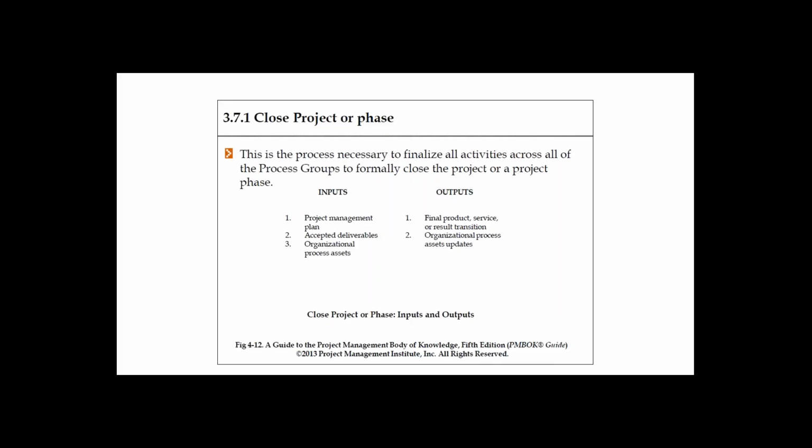Result transition, what is it? Can anyone give some light on that? I think it's knowledge transition, Raju. Yes, that is one part of it. And other things include aspects into knowledge management, where whatever we have learned or whatever important documents we have, we put into the organization knowledge management system, so that moving forward anybody can pick those up and come out with whatever cost analysis or time analysis.